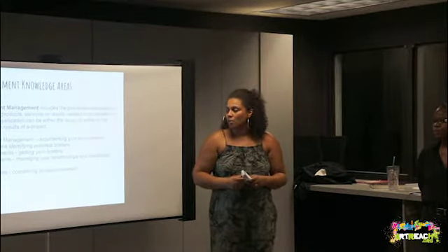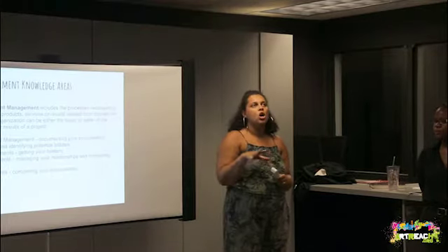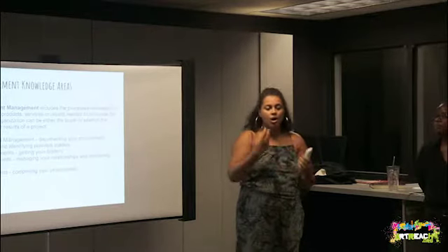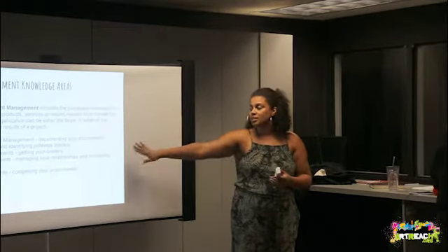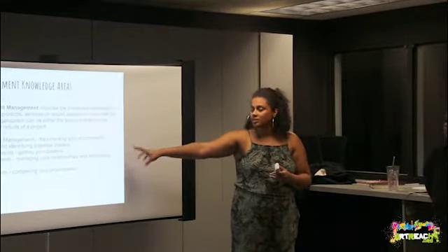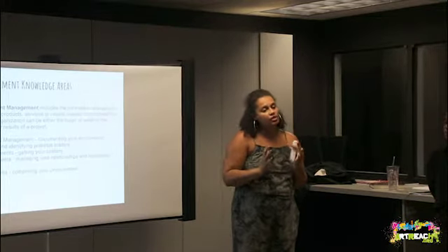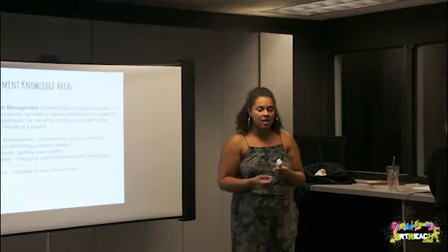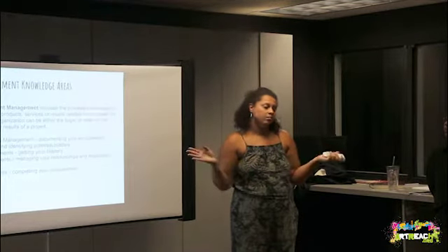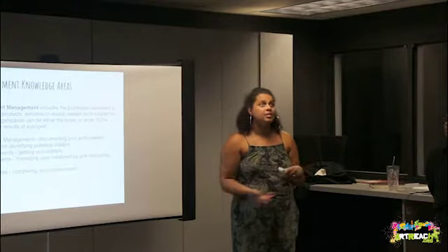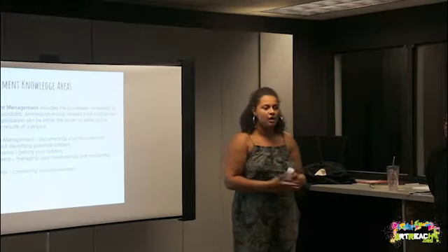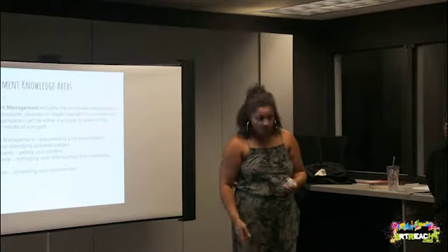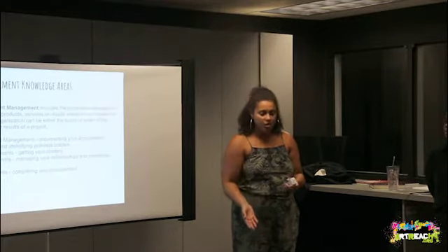Control your procurements. You're managing your relationships and monitoring your contracts. So once you are procured or you procure somebody or a contract, this little section just spells out how you're going to manage that relationship and monitor your contracts. You don't want to just write a contract with somebody and say, great, we all signed it, and then wait until something happens and you have to go back to the contract. You want to make sure that they are doing what it says in the contract. Don't go back to the contract when there's a problem.